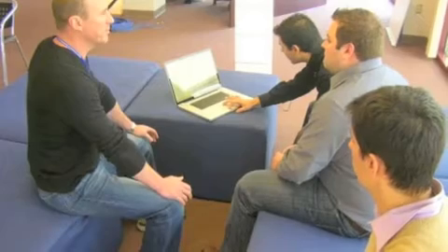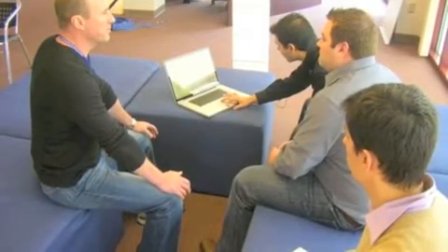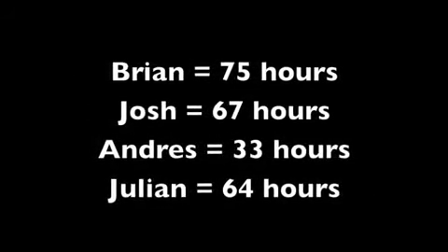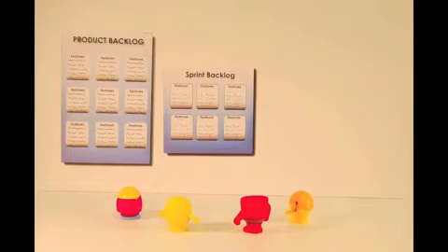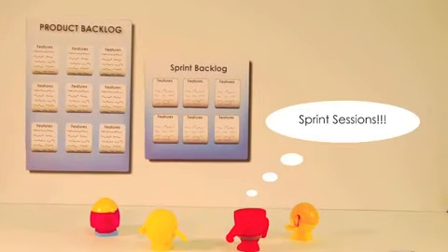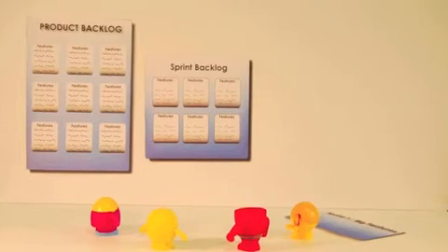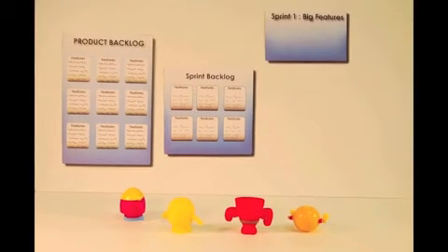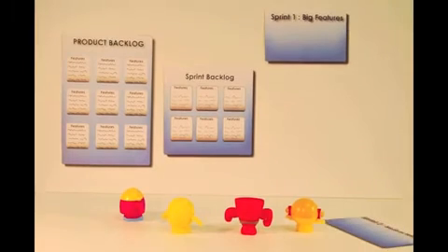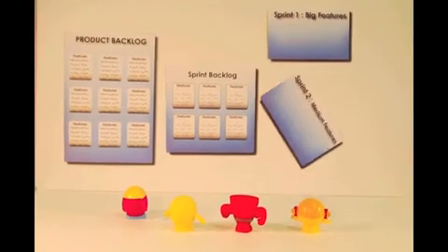It is recommended to have 3 or more subject experts to estimate the hours. Estimating the hours of each task will be important because the Scrum Master will need to know how many hours the team will be available for each sprint and which tasks will be developed on each sprint. After we have planned everything out, the tasks become available to everybody on the team. So when the developer finishes a task, he or she will be able to get a new task that interests them. We use SharePoint in the Innovation Lab, so when a new task is picked by somebody, the document is updated.